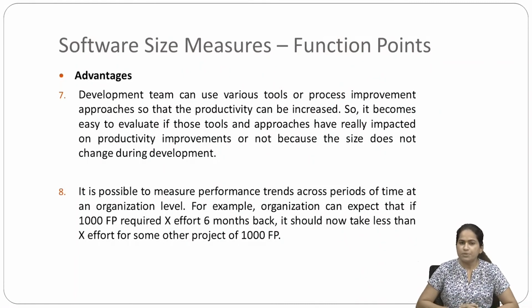It is possible to measure performance trends across periods of time at an organization level. To understand that, one example is given. An organization can expect that if 1000 FP required X effort 6 months back, then it should now take less than X effort for some other project of 1000 FP.